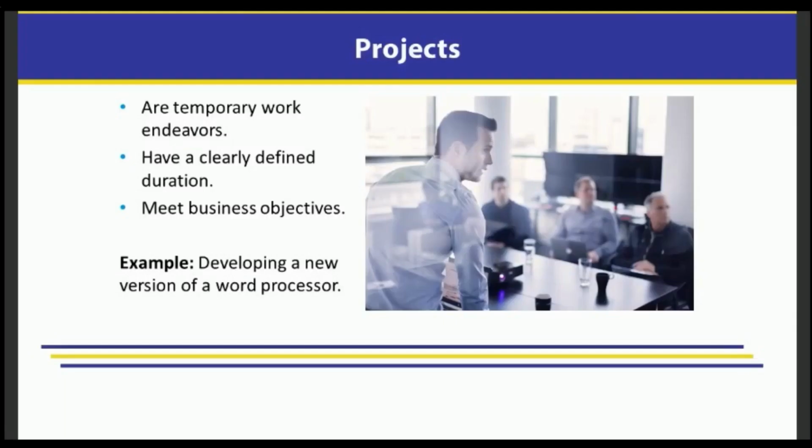Unfortunately. So when we talk about operational work, it's just stuff that you have to do all the time. A normal day-to-day job that will not end. It's really important when we talk about estimating later on that you recognize how much operational work you have and how much operational work the people on your project have, because we need to take that into consideration when we're looking at how long it will take them to do tasks on the project. Right, so 100% of their time won't be on our project. They still have their normal stuff to do too. That's exactly right. And we'll talk more about that later.